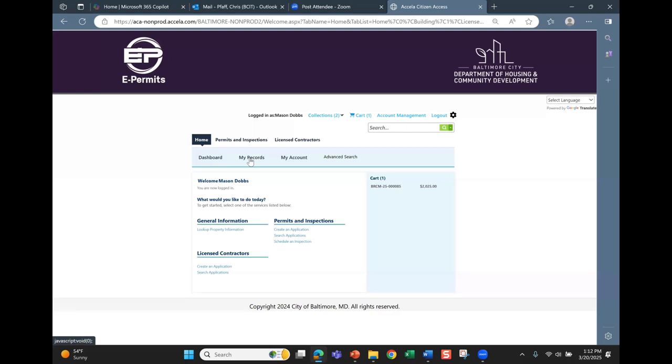Well, with the older applications that came from E-plans, once the reviewer reviews your contractor application and everything is correct, then they should be putting it in ready to issue for you to get the permit. And in the new system, once they finish the review of the information you've added, then you should get the email to pay.